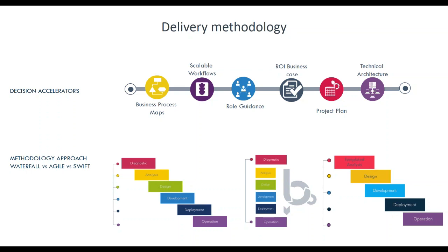Swift is a Quantic-specific methodology where we start with a standard system walkthrough and coach the project teams on completing a set of predefined questionnaires. The answers will be used to provide a base client configured system, and this saves time on analysis and design, to prevent lots of gap development being considered or completed in the initial phase.